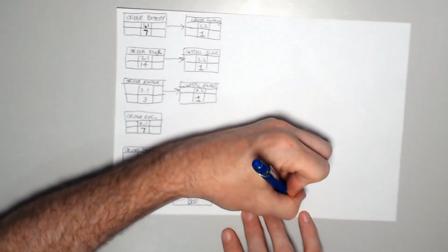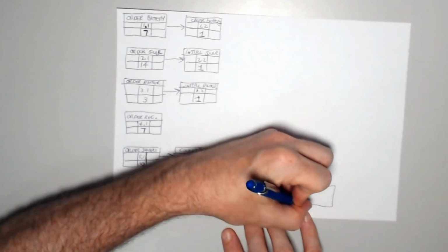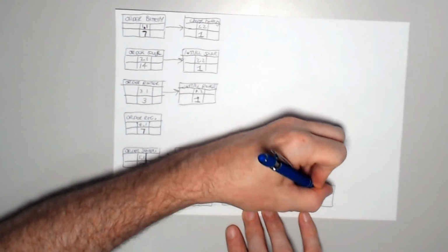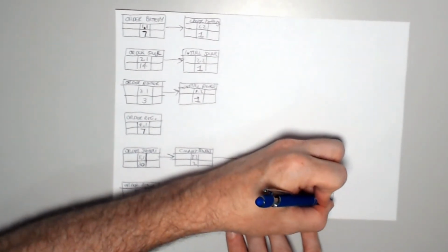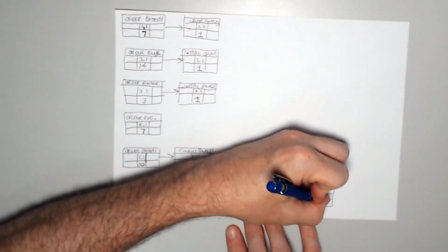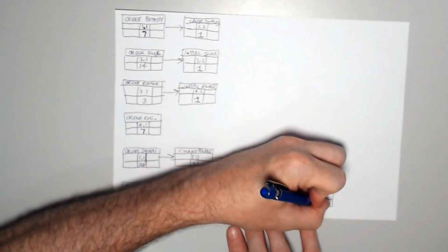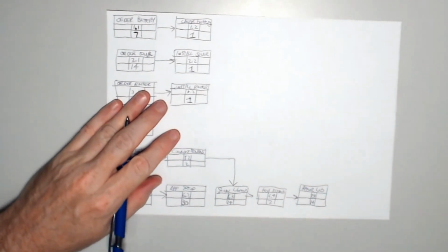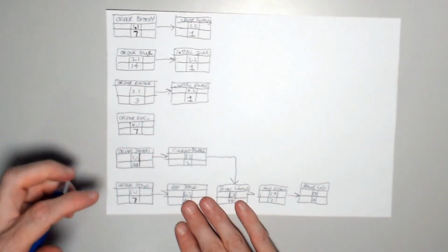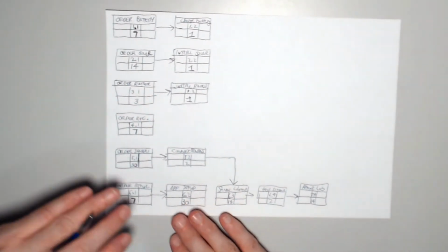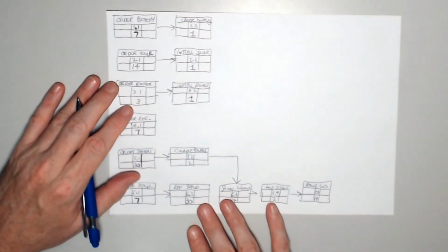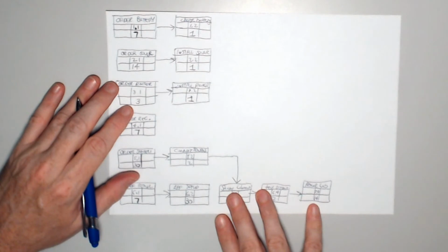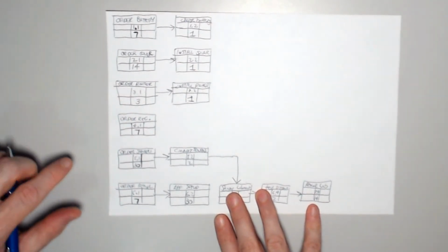Then we wanted to do our lab test of the atmel. So a proper test, and that's in the lab. So we don't need our battery or solar for this. Lab test, and that's 7.4, and it's going to take 14 days. We're going to run the test, let it run overnight for 14 days, so we can measure, because it is a weather project, a weather sensor, so we can measure humidity, rainfall, and temperature over an extended period.